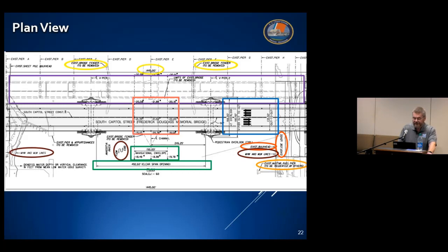All of this stuff constitutes valuable information for mariners, and we in the Coast Guard think it's a good idea for it to be included when we generate a public notice. We circled the ebb and flood cycles for the channel in brown, as well as the mean and low water lines on both sides of the waterway.